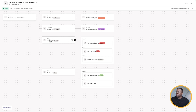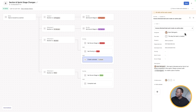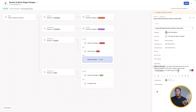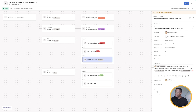Here's our rule: when a task is moved to the section blocked, we set the scrum stage to blocked, set the priority to high, and create a subtask assigned to our COO that says 'assess blocked task and create an action plan.' Within that subtask it says: 'Hey Kate, this task is blocked and at risk of not being completed in this sprint — please connect with the rule trigger.' The rule trigger is whoever moved the card to blocked, so their name populates automatically. We're using variables — you simply come into the rule, click the plus, click variable, go to people and rule trigger, then add mention that person.